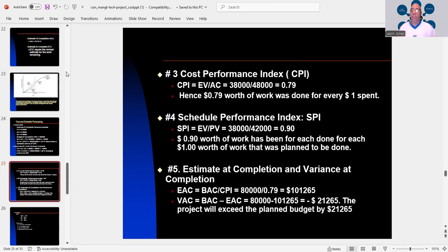It's almost 80%. Or let me backtrack, for your cost performance, you're almost 1-to-1. But like I said, for every dollar spent, 79 cents worth of work done.